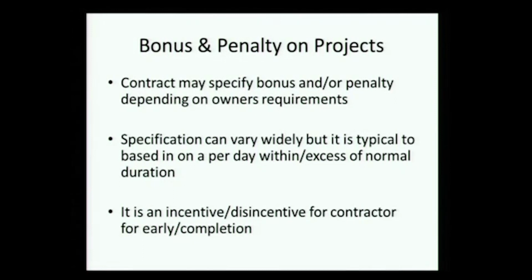Okay, now let us move on to the next variation of this problem, which is bonus and penalty. We want to now include bonus and penalty. All of you are aware that in many contracts there are bonus and penalty clauses, based on what the owner requires, and typically it is on a daily or weekly basis. If you finish so many days ahead we give you a bonus, if you finish so many days late it is a penalty.